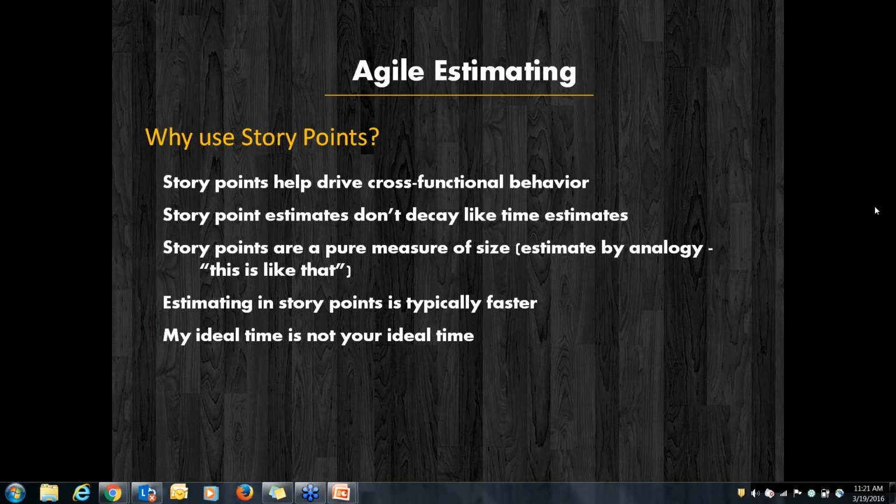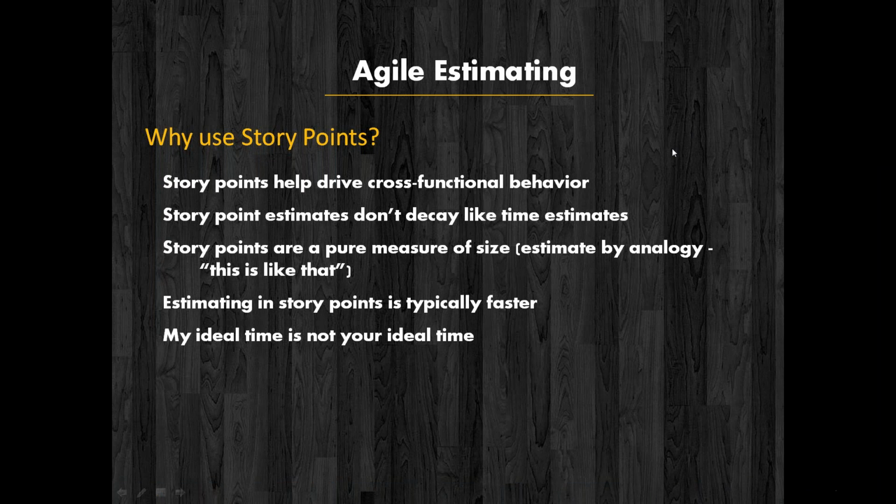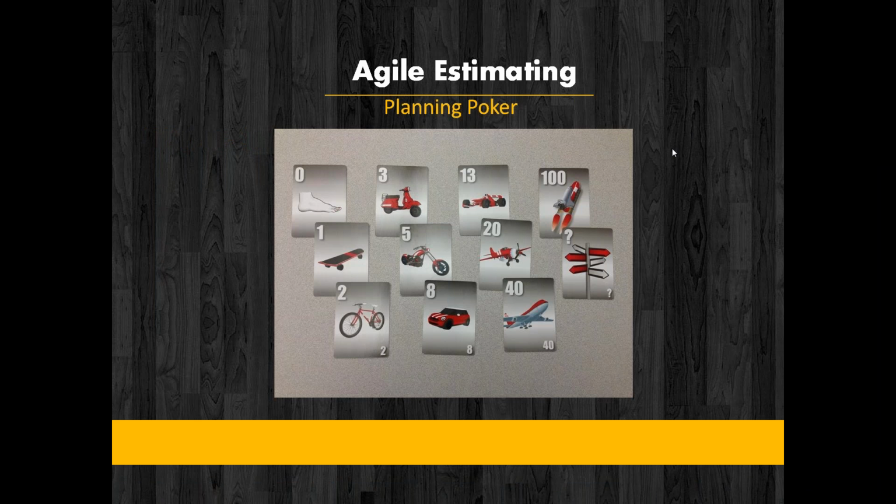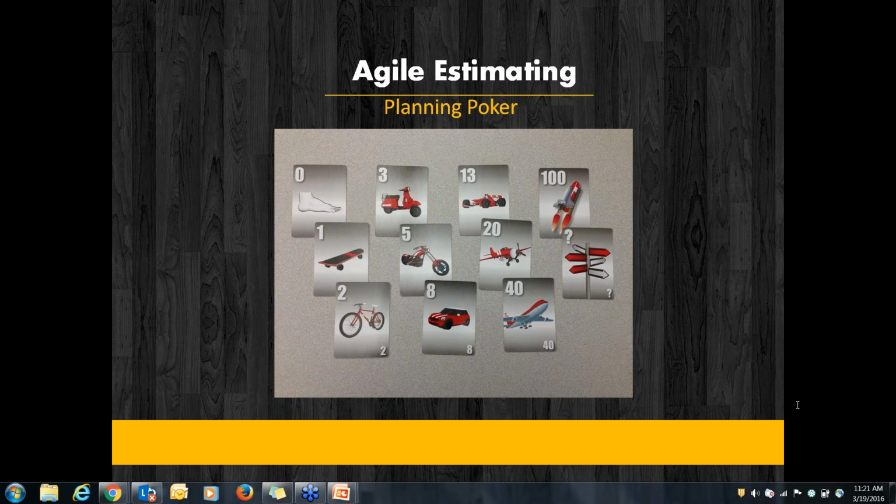And just one caveat here is that I don't know how far it is true in different places. We say that teams should come together and have consensus before giving some kind of relative number, in terms of story point numbers or whatnot. Now we bring in those team members who don't understand this entire process in the first place, and when the Agile coach or whoever sits in the room starts recommending and asking for this consensus, people would just pick one flashcard to get out of that meeting. They don't care much after that, because they don't understand what this 1, 5, 9 or 8 and 40 means to them.